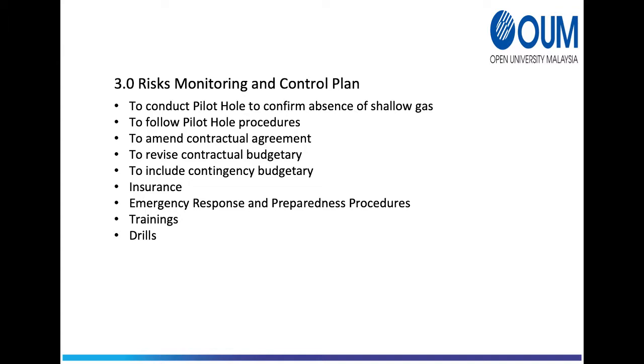Due to potential of shallow gas present, one of the controls that has been taken was by conducting a pilot hole drilling. In areas where preliminary examination have not ruled out possibility of encountering shallow gas, a pilot hole incorporating special safety features and procedures needs to be drilled. Pilot hole drilling is mainly to investigate the absence or presence of this shallow gas at proposed soil boring location.